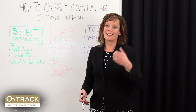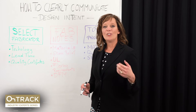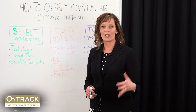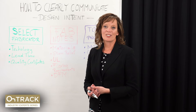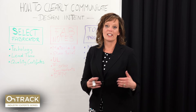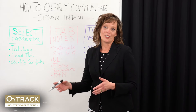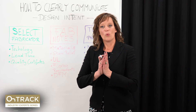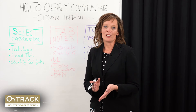I also want to step back to prior to the PO. If you know that you have a long lead time material — say something is four, six, or eight weeks out — work with your fabricator and pre-order that material so that lead time is taken into account while you're finishing the design. Hopefully you can time things out so that once you're ready to release the product for prototyping, the material is available.